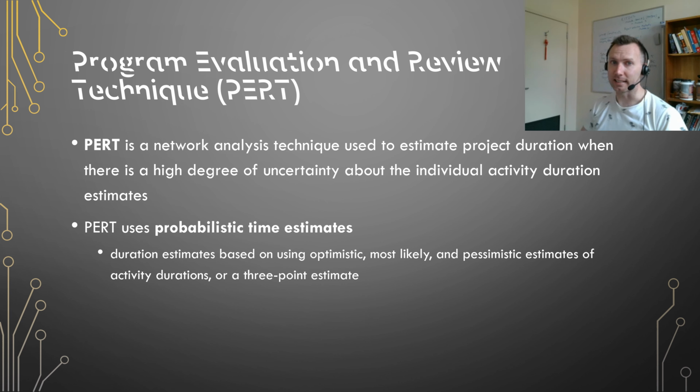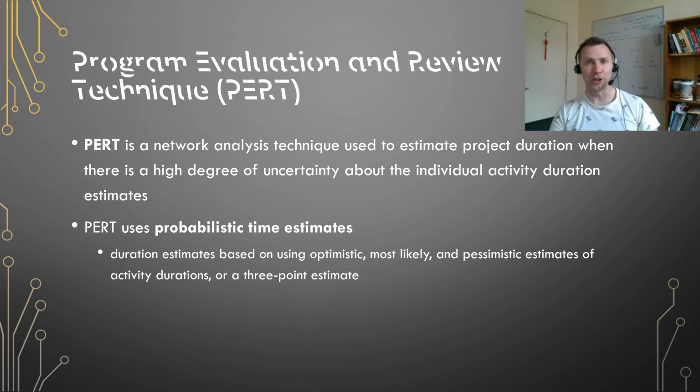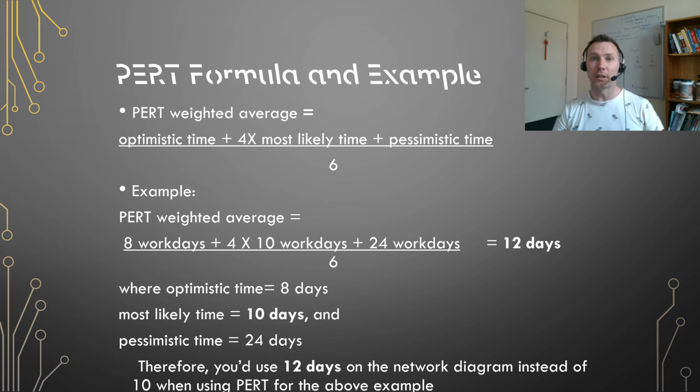The PERT technique, Program Evaluation and Review Technique, allows us to try and schedule our project when we are in conditions of uncertainty in the project. With PERT, we work out optimistic, likely, and pessimistic durations for the project. We talked about this earlier as the 3 point. PERT works on a formula for calculating how long things should be indicated on the network diagram.